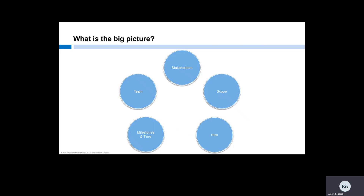Milestones and time — there are three definitions related to how we achieve our project objectives that you need to know: milestones, deliverables, and tasks. Milestones are the big ticket items that our objectives are built on. Deliverables are the tangible items that are needed in order to achieve project milestones. Tasks are the baby steps that need to be done in order to complete the deliverable. For example, if IRB approval is a milestone, then the deliverable is completing the application, and a task would be answering the questions on the form.